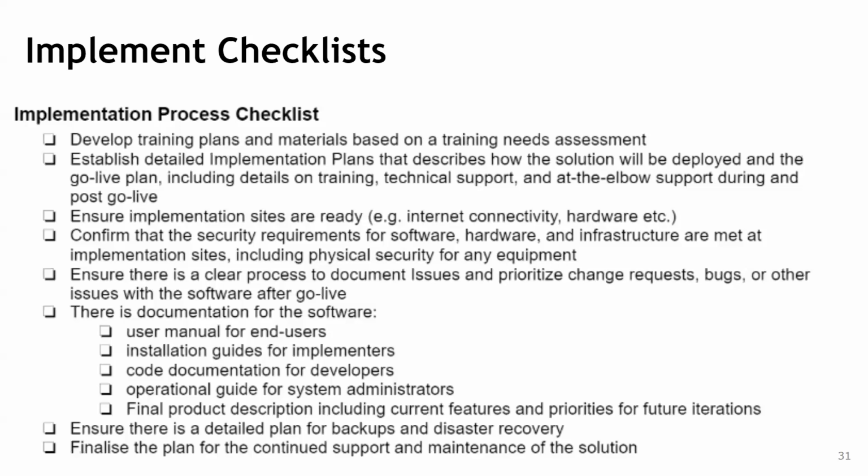We might not think about those things, but it's very important, because the reason some of the projects fail is because there's no support going into the future, and then staff will leave the organization, and new staff come in, but they're not properly trained, and then the organization will stop using the software. However, if there's support and it is documented, and you plan for it, then the continuity can be managed better.